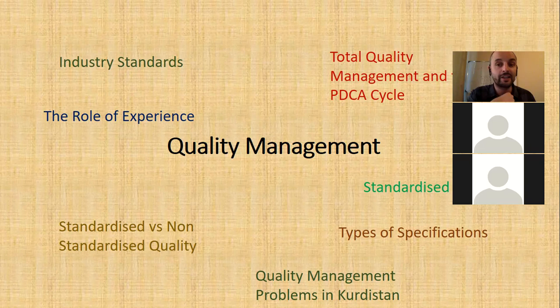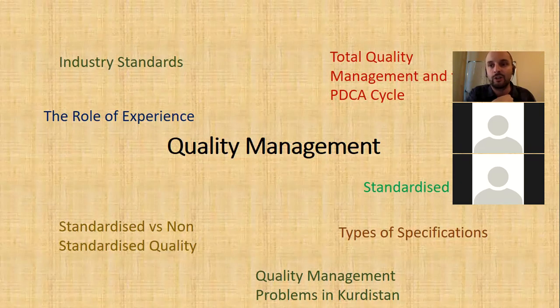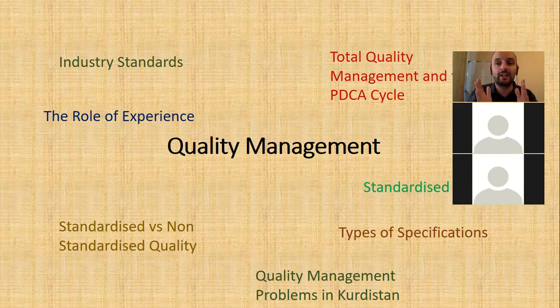The key ways they do that is they use standardized designs, they use building standards and guidelines, which were basically formulated from previous projects. And also you try to hire people in the project team who have experience in previous projects of a similar nature. Those are the key ways you can improve quality. So when I was on tender evaluation teams and we were looking to hire companies for projects where it was very important the project got done at high quality, experience of the personnel was one of the key parameters that we looked at.